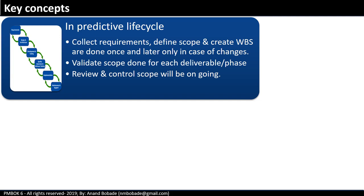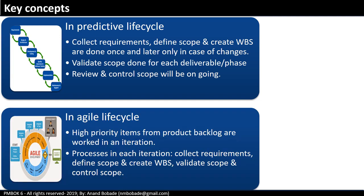In agile projects, initially a product vision is developed, followed by a product backlog — the list of high-level product requirements based on the product vision. High-priority items from the product backlog are added to an iteration, sometimes called a sprint. In each iteration, the processes include: collect requirements, define scope, create WBS, validate scope, and control scope. As per PMI, scope management processes are followed in both approaches, however how they are applied is different.